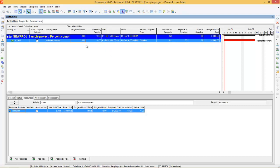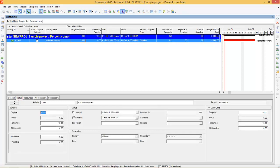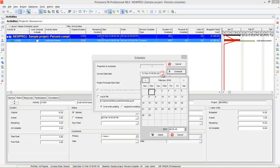Now let's assume we are updating this project on the 5th day. According to the plan, you should have completed 50%. But in this case, I'm updating it as 40%. To update, go to Status, say that the activity is started, and enter the remaining duration as 6. Now you can see the duration percentage becomes 40% — this is the actual duration percentage. Now go to the Schedule button and reschedule the project to the 5th day.